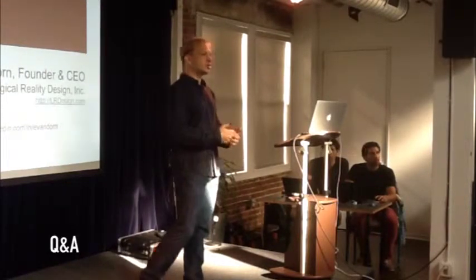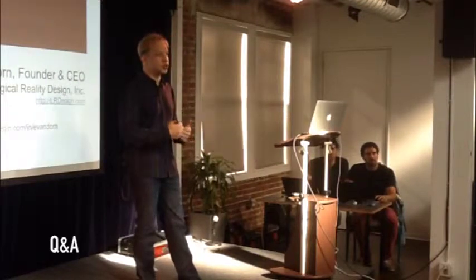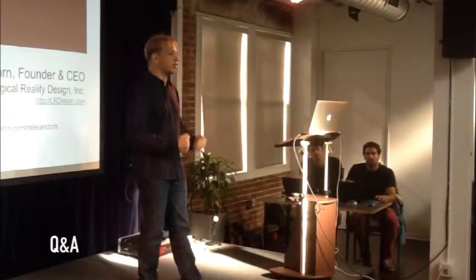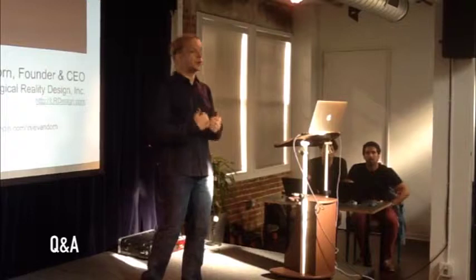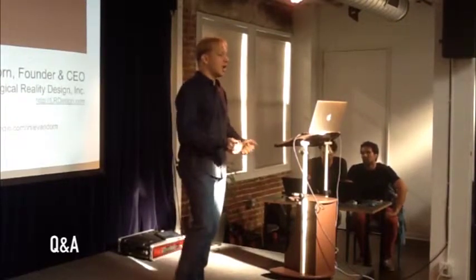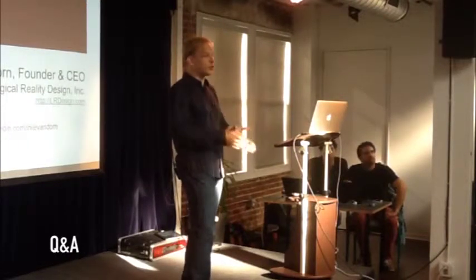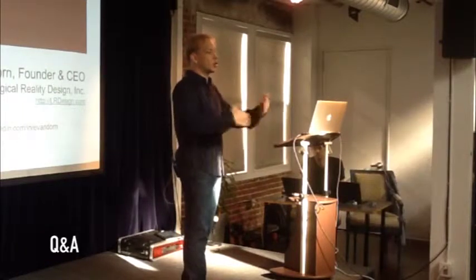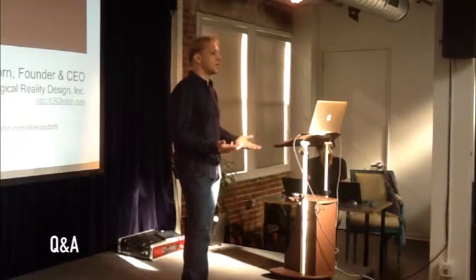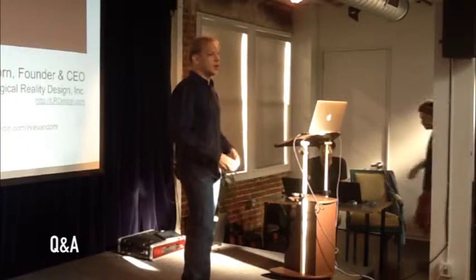What I would suggest is that it is really hard to do contemporary software development with a fixed feature set, because you need to be able to respond to changing market conditions. As you get user feedback, you need to be able to add new specifications. If you've negotiated a fixed price for a fixed feature set, now you have to go back and redo those negotiations when you add a new feature. So effectively, you're issuing change orders all the time, and you end up spending a very large fraction of your time in price negotiations as opposed to getting the task done.